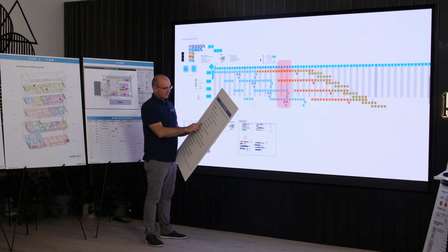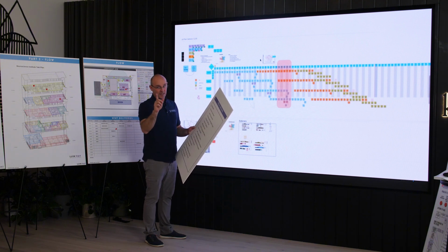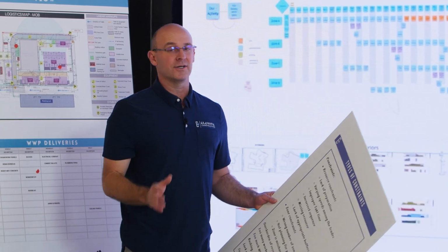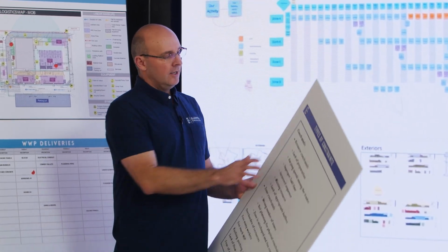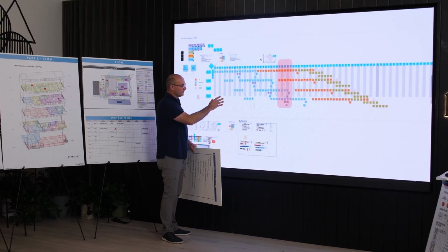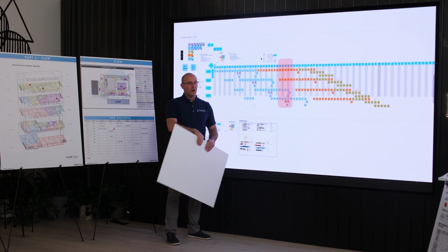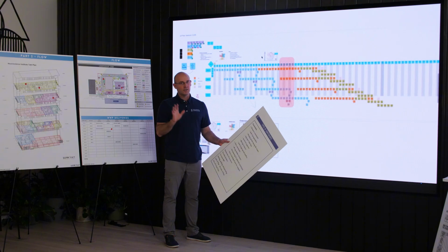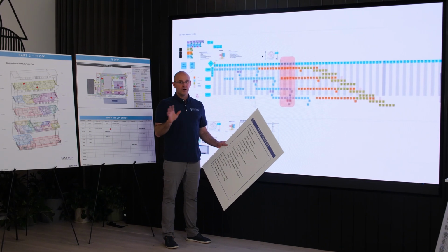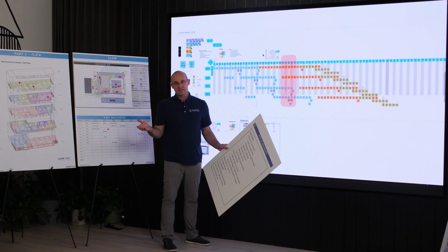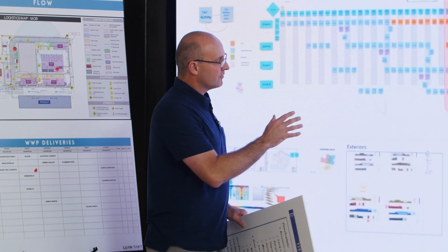Do we have the correct sequence? Do we have any missing resources? The pull plan did that for us. Wrong number of zones. We figured that out in the calculator. Can you now see that constraints are system designed in the pull plan? By the time you're done with the pull plan, all of these should be optimized. They should be like literally not bottlenecking you. Or if they are, you know about it and it is your most limiting factor, but you've optimized it as much as you can. Now everything after the pull plan will be mainly focused on roadblocks.